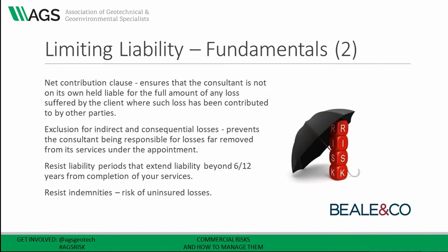Your appointment should include a net contribution clause. Where there are other parties who are also liable to your client, a net contribution clause limits your liability to paying a fair share of the loss, on the assumption that the other parties have also paid their fair share. This reverses the common law position of joint and several liability, which allows the client to recover the whole of its loss from any one of several liable parties. A net contribution clause places onto the client the risk and cost burden of pursuing multiple parties, and means that if any of those parties are insolvent, the client also carries that risk. These are fairly standard nowadays and insurers will expect to see them in your appointments.